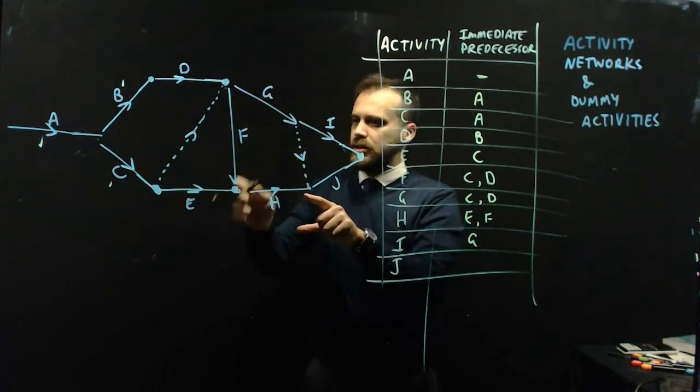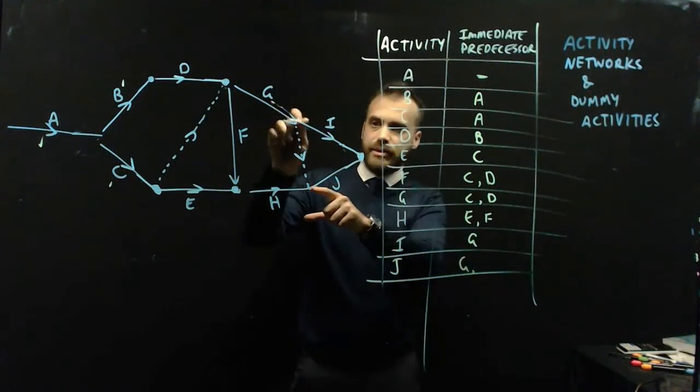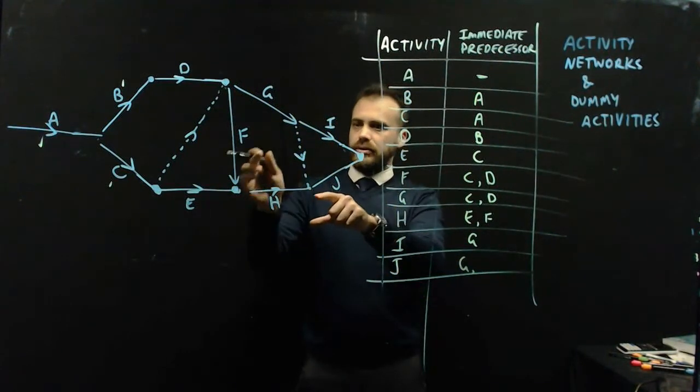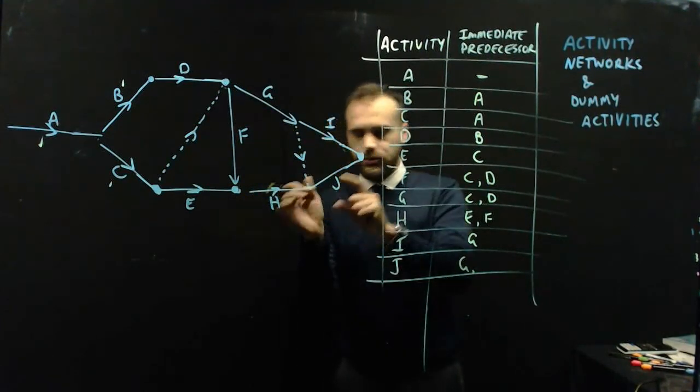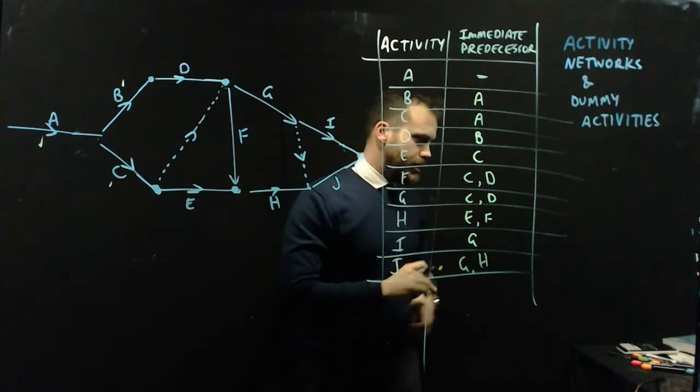Which means that J has an immediate predecessor of H and the dummy activity of G. Which is G. So two here. G which is the dummy activity, and H which is this one here.